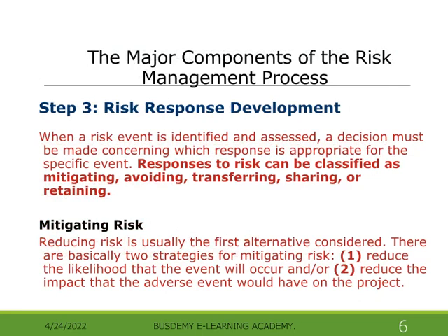Step 3. Risk response development. When a risk event is identified and assessed, a decision must be made concerning which response is appropriate for the specific event. Responses to risk can be classified as mitigating, avoiding, transferring, sharing, or retaining.